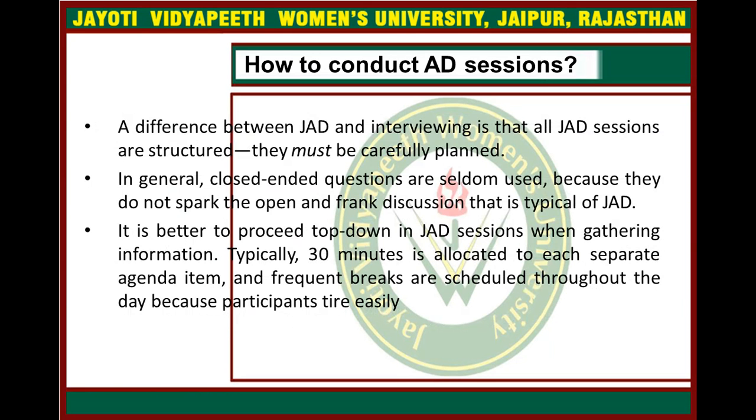Now, the difference between JAD and an interview is that all JAD sessions are structured. They must be carefully planned, right? In general, closed-ended questions are seldom used because they do not spark the open and frank discussions that are typical of JAD. Of course, it is better to proceed top-down in JAD sessions when gathering information.